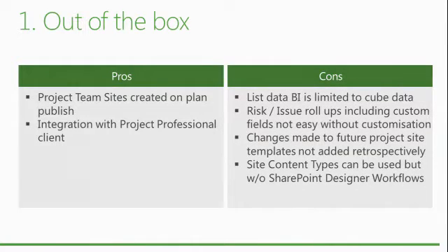Team sites are created automatically when you create a plan. So if you're a project manager, you're living in that project management world, and you're in your project client. You create your plan, you save it. Do you want to create a site for this? Yes. It creates that site for you as well. And there are nice links in there, and it sorts out the security based on who's attached to your plan. It's all really cool.